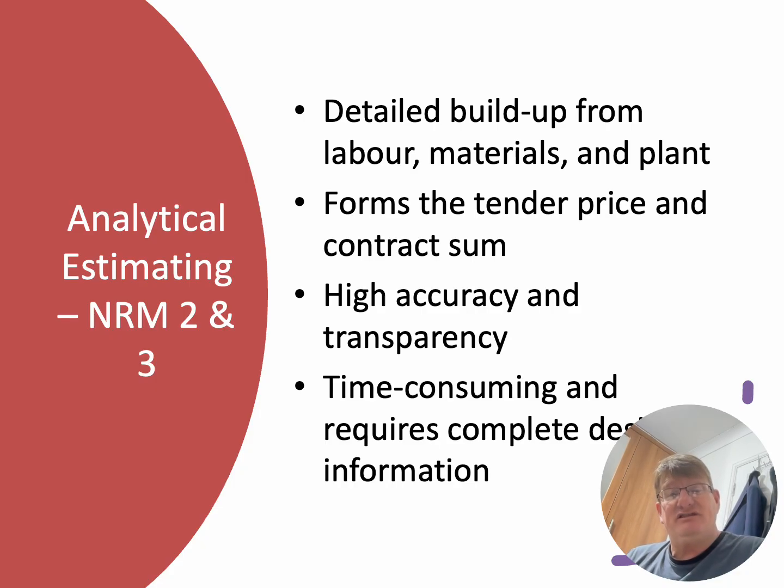Okay, high accuracy, good transparency. Okay, but as you found when you did the exercise yourself, you need a lot of information. You need some really accurate drawings. Otherwise, you've got to make a lot of assumptions, which you guys had to do because I didn't give you a lot of drawings to work from. It can also be time consuming and requires a lot of information, just to reinforce what I just said there.